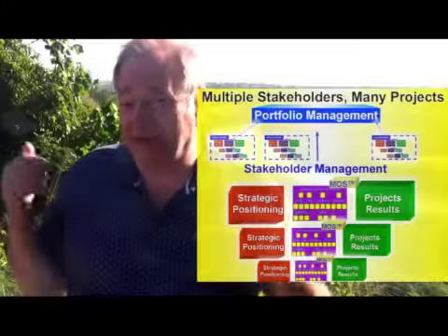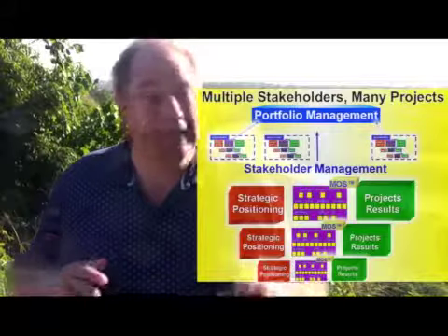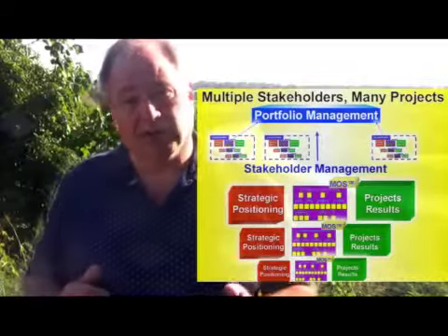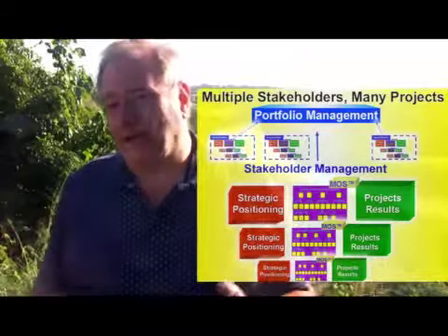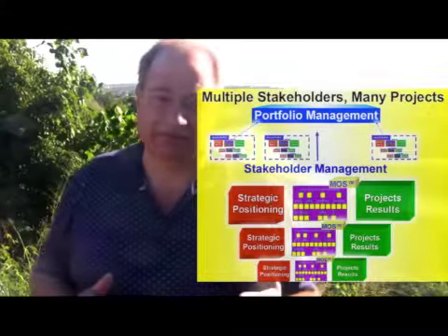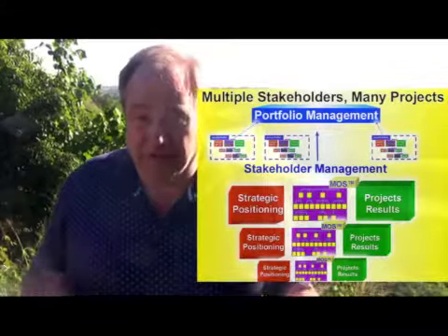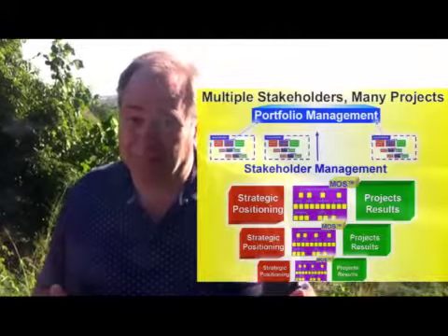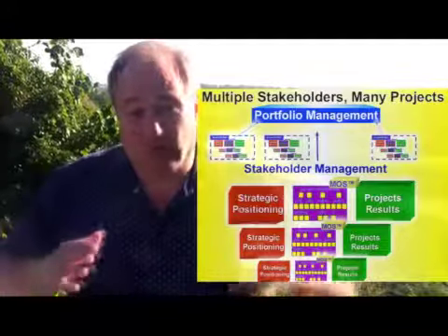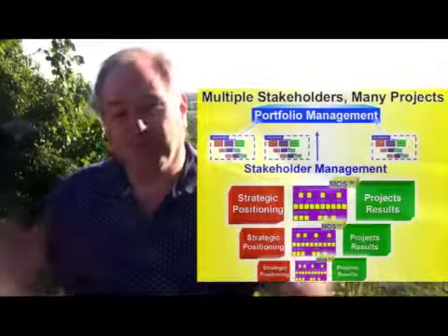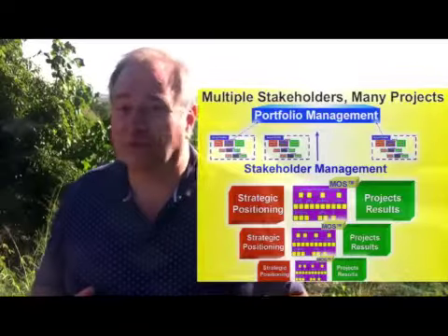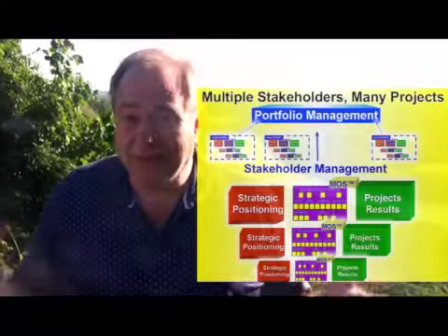And you're going to have some of these stakeholders playing a role in multiple of your projects. So having sound strategies for dealing with them is obviously a critical area of success, and frankly, executive support, or the lack of it, is the #1 cause of failure for large programs or portfolio management efforts.